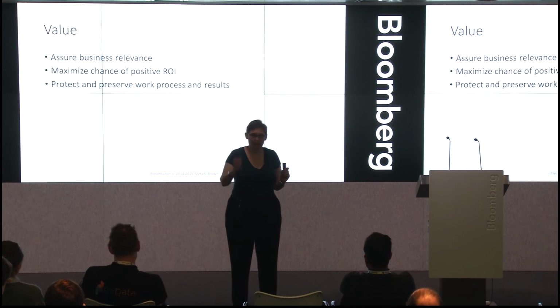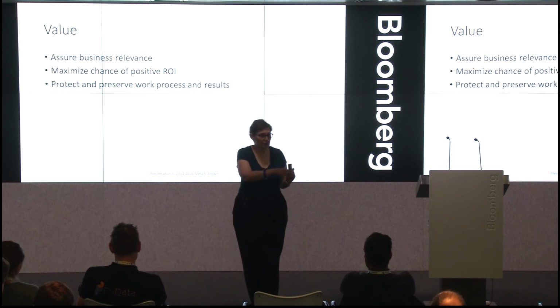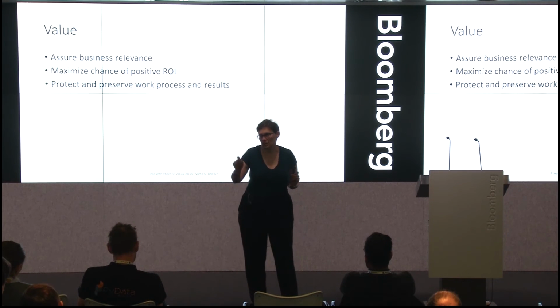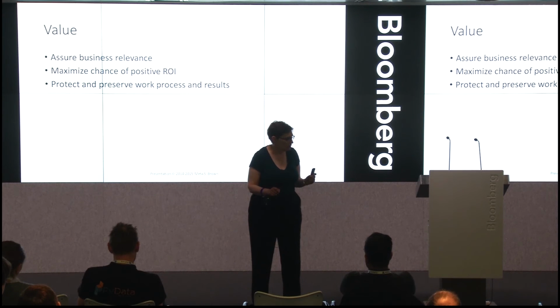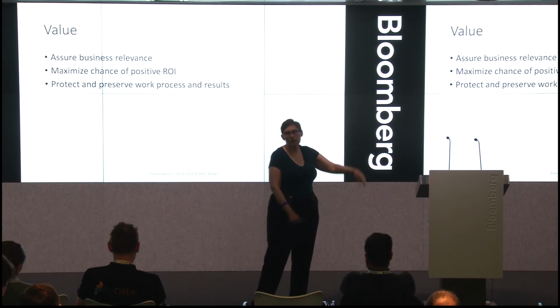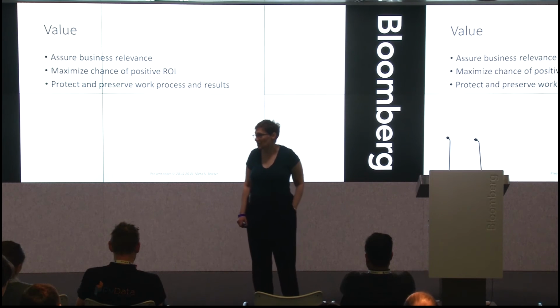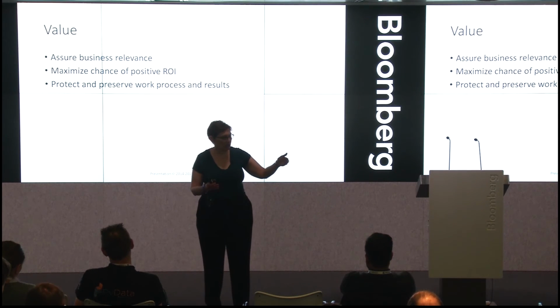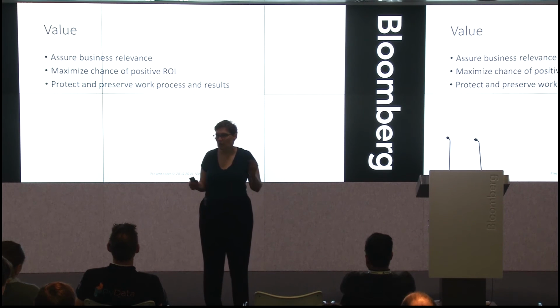You don't have positive ROI unless you started off with a defined goal and, in fact, have measurable positive returns by that goal. And let me give you a little hint that managers don't tell you. If you're about to propose a project and you need to show how it's going to produce benefits, I, as an analyst, always think, ooh, the big benefits are in increasing revenue. Do not make your business case on increasing revenue. Make your business case on decreasing costs, and you're more likely to sell your project. Because management believes you can decrease costs, they don't believe you can increase revenue. And the political complexity of deploying something to increase revenue is much greater. So they may also know that they can't execute on that. That has to be your secondary benefit.